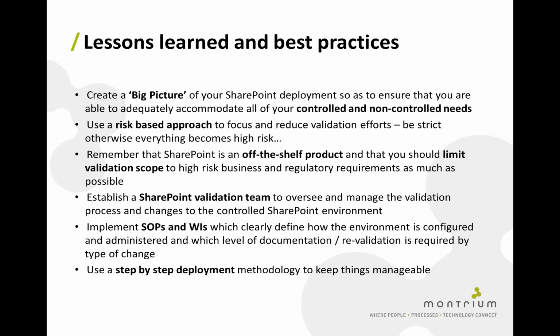So think about maybe bringing in an independent individual who can actually mediate your risk assessment process. Remember that SharePoint's an off-the-shelf product, and therefore you should limit the validation scope to high risk business and regulatory requirements as much as possible. You don't need to test every single functionality of SharePoint because Microsoft's already done a very good job of doing that. Establish a SharePoint validation team and make sure that team remains in place once you've actually completed the validation, because that's the team that's also going to oversee change control and even be there as champions in the use and the evolution of that system.